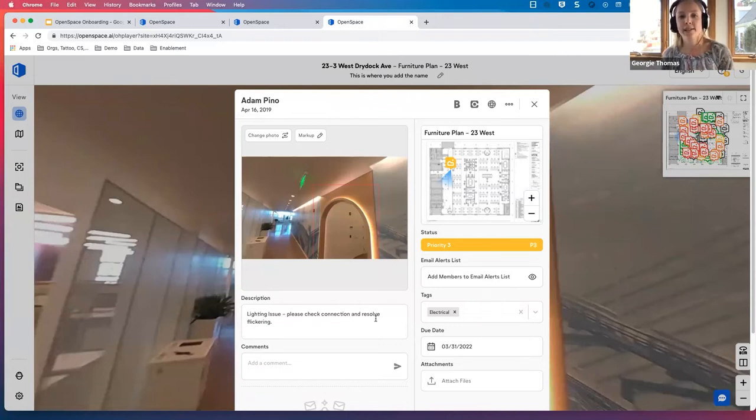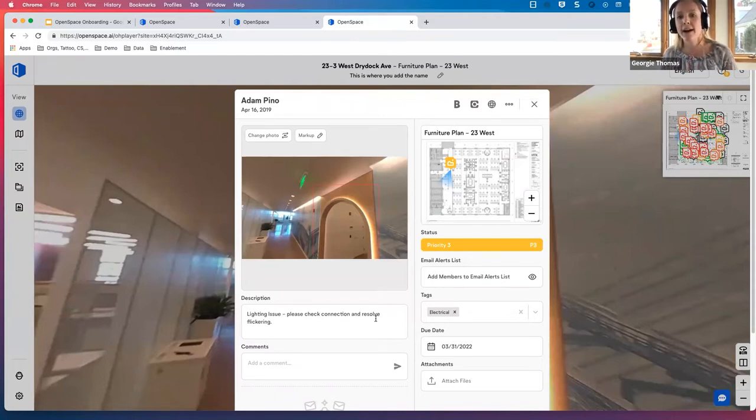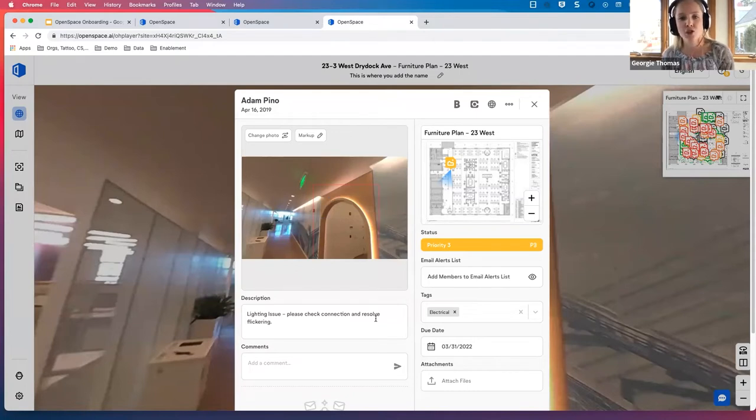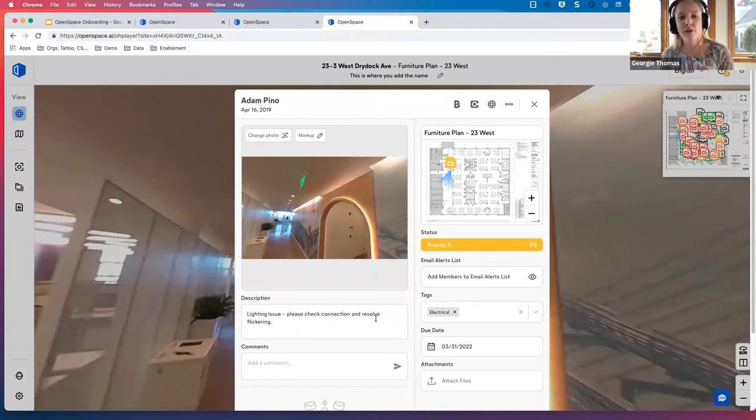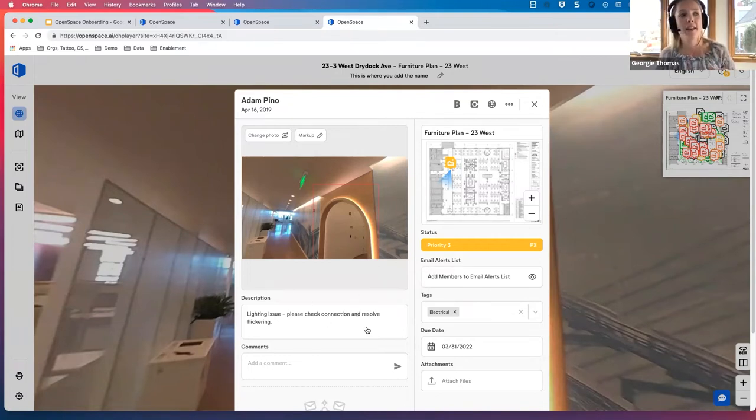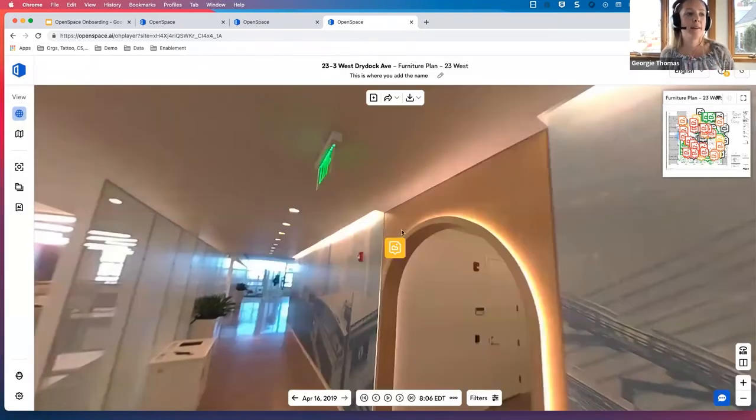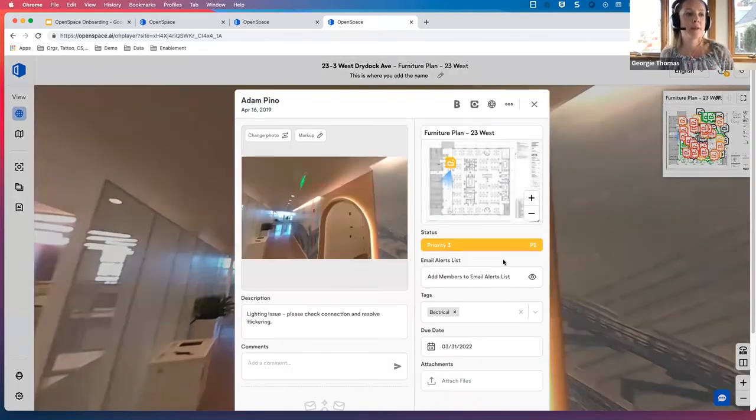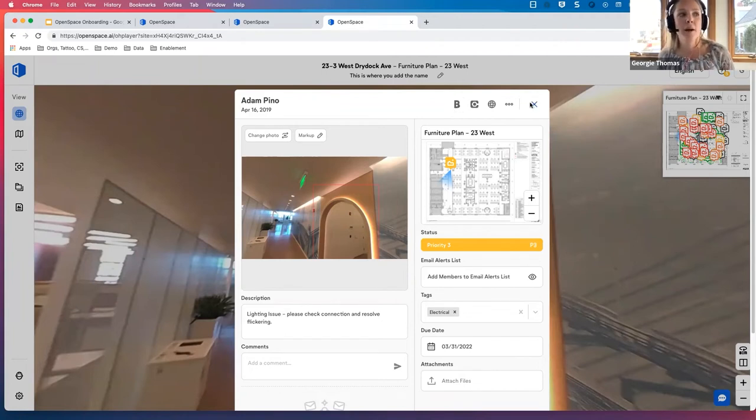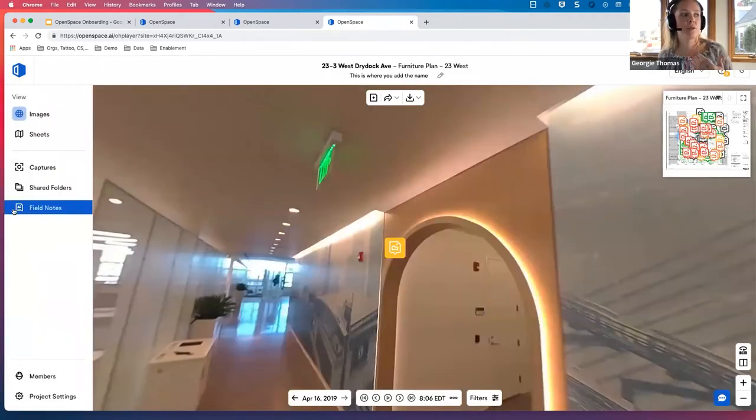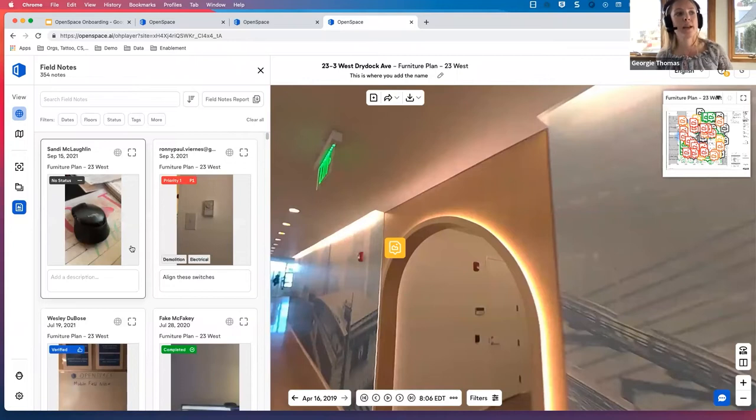Field notes can be taken directly while you're capturing, as I mentioned earlier. So if you're on site and you have a camera on top of your head and you're taking a capture, let's say there's a crack on the window, you might need to document an issue or alert someone. You'll simply pull out your mobile device and in the OpenSpace mobile app, press field note, you'll then take a photo. If you have time, fill out any of these fields or use voice to text to quickly add in a comment, and then it'll upload right away.